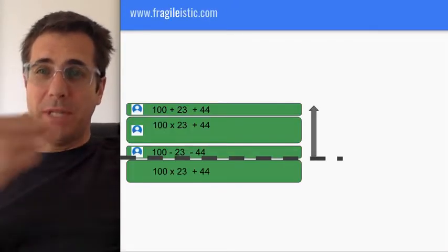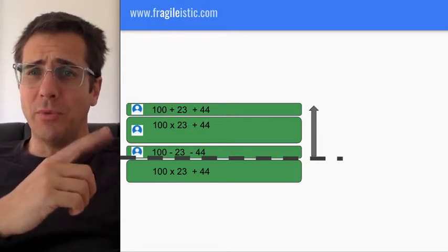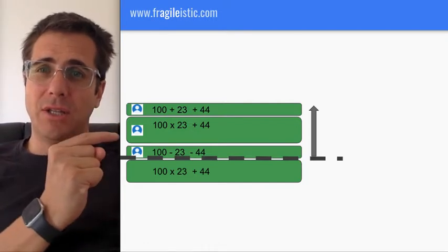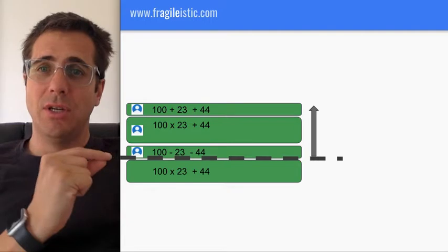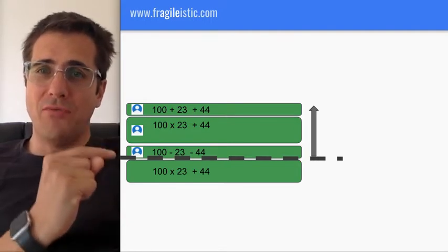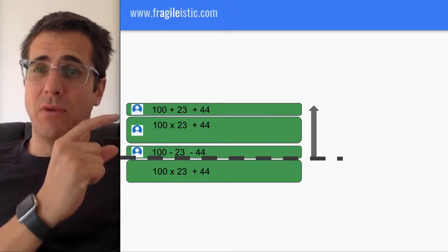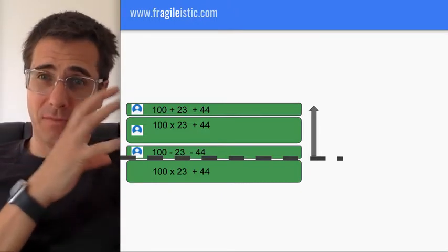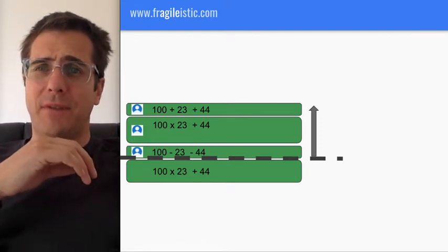Let's go back a couple of steps. At the end of a planning session, you're going to end up with a backlog, called a sprint backlog or an iteration backlog. These are the user stories, the increments of value we're going to deliver in this fixed time box. It's a prioritized backlog, which is why you've got the arrow. Everything's assigned, so we know what the responsibilities are. We've not really talked about how we're going to get it done in the sprint, but we have talked about the goals for the sprint, and we size them. That's where we left off last time.